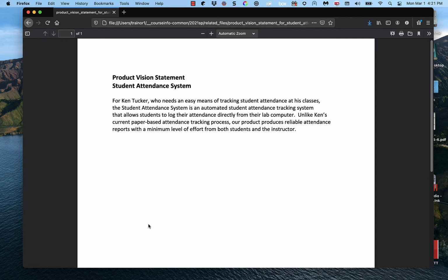If it's not, it's not a final thing where you say we're not going to include this on the backlog. It's more like this: either we don't include it in the backlog, or maybe we've changed our vision. So if we're going to include it on the backlog, let's also do a little surgery on the vision statement so that it's consistent with a vision that includes the user story we just put on the backlog. That's the relationship between those two components.